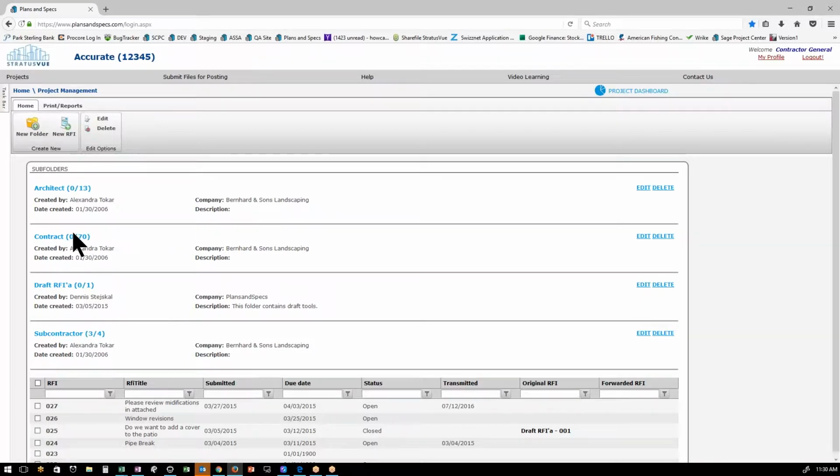The nice part is that once the subcontractor writes an RFI, that will come to whomever is the designated person within your company. They'll be able to read that, answer it directly if it doesn't need to go on to the architect or reviewer. If it does, then we'll forward that, and that'll bring it into your RFI log, and then you will not have to type anything out, which is nice. So that is what I'm going to do between this setup.